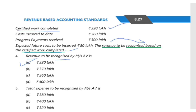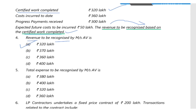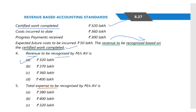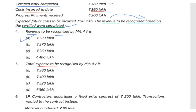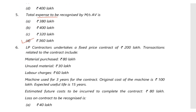Total expense to be recognized: the cost incurred to date is 360 lakh, so it is option D. Next question.